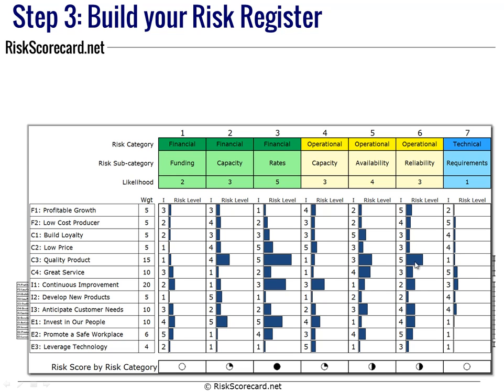And what we begin seeing is the bar charts represent where risk looks like it's occurring. So if we look horizontally, we can see quality products seems to have a lot of possible risks associated with it. We can also add up these columns, and these Harvey balls describe to us the quartile of risk. So this is obviously in the highest quartile, this is in the second quartile, this is in the first, and here's none.